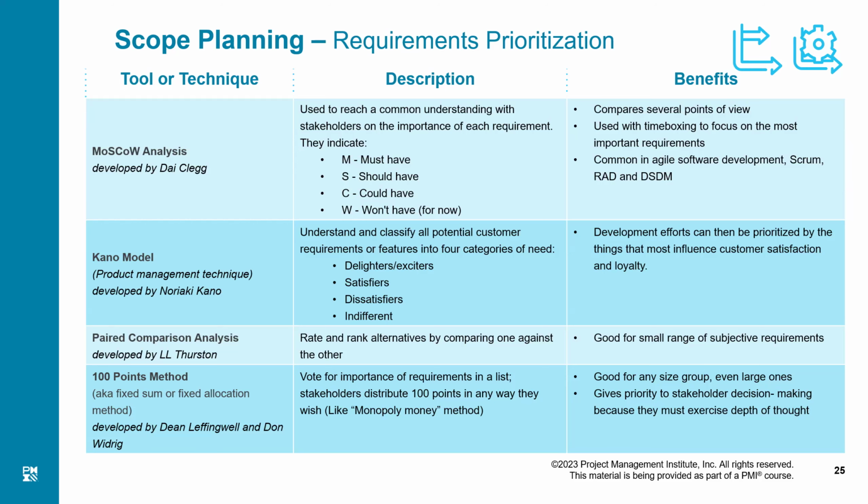You're talking about paired comparison. Yeah, paired comparison. So you have a list of all of your requirements and you just ask, is this one more important than the one above it? And then you rearrange things. Yeah, it's a little time consuming, but it is very absolute. It gives you a completely and highly prioritized set of requirements.